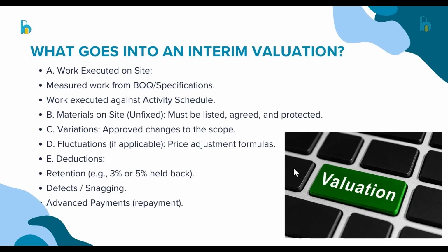Number one, you will have an agreed written document to the client that this belongs to you and this was purchased for the sake of that project. And the client needs to have full access to those materials offsite, whereby whenever the client feels like moving those materials, he has the ability to move them.